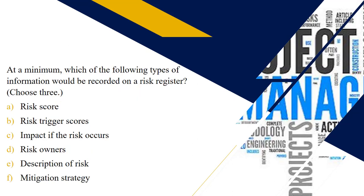At a minimum, which of the following types of information would be recorded on the risk register? Select three from this list. Standard information that exists on a risk register might include an identification number, a description, the probability and impact, a risk score, and the owner — as they all relate to risks.